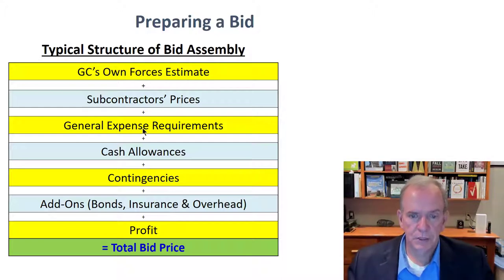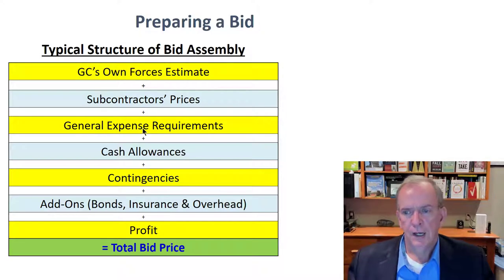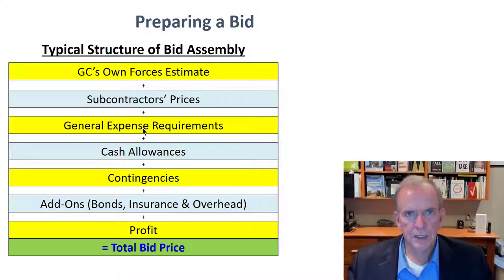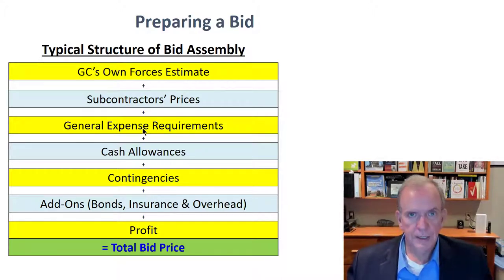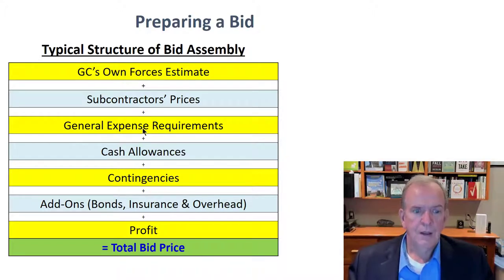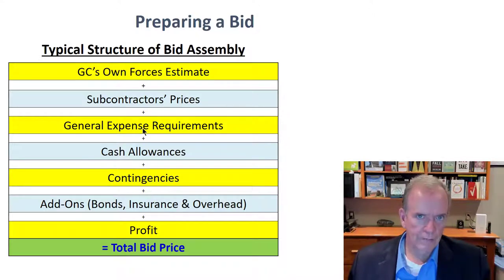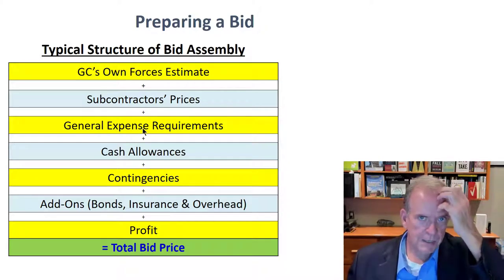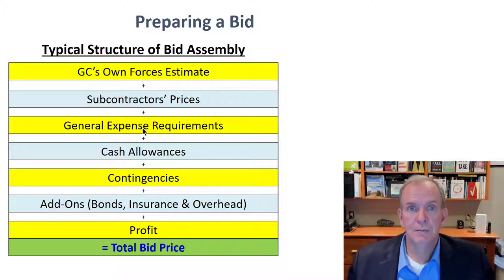One hour after you submit, at 12 o'clock, a committee comes down, they line up, and they open the bids one by one. They announce who the company is — sometimes just a numbered company like Ontario 54321, or in our case they'd say Simon Stevenson Contracting — and announce the bid amounts. You'd be writing down the bids as they announced them, and if you were the low bid you'd get the project. They also reviewed the documents; if insurance wasn't there, the bond wasn't there, or something wasn't signed properly, it would be disqualified.